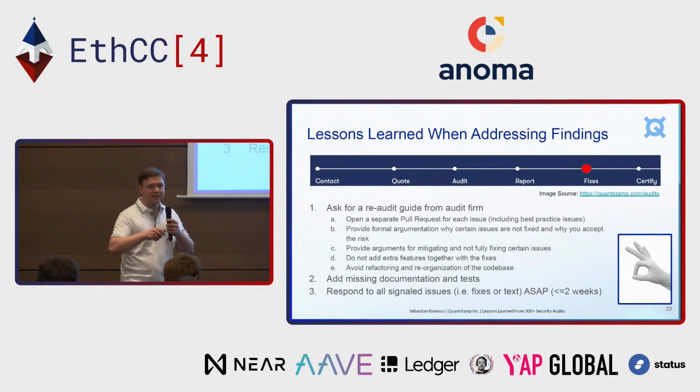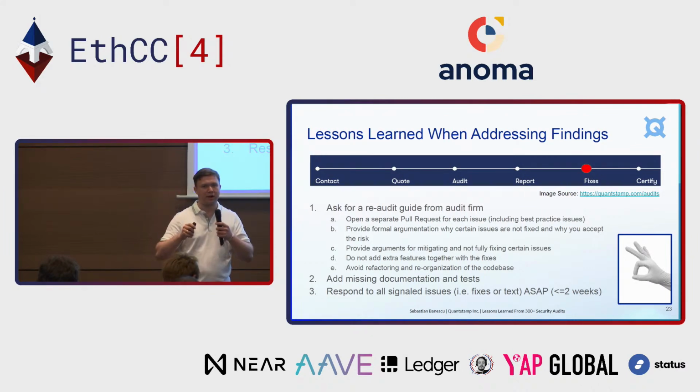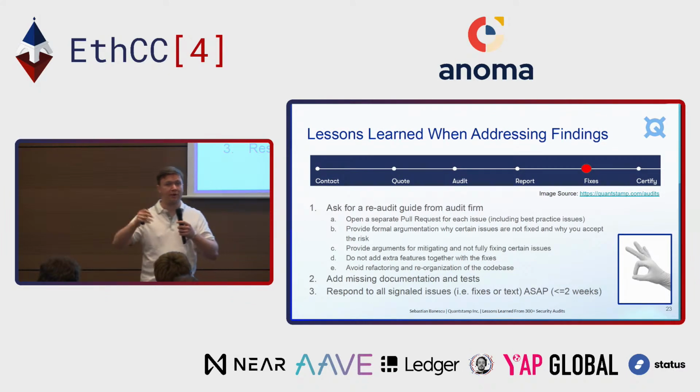Sometimes the project is big, and we need more than 3 auditors. The default is 3. If we need more, we assign more, and we plan for it in advance, probably a month in advance, for when it's going to be done. We communicate the deadline to the customer, and if they agree, that's great. When we start, we do all of those things which are mentioned there.